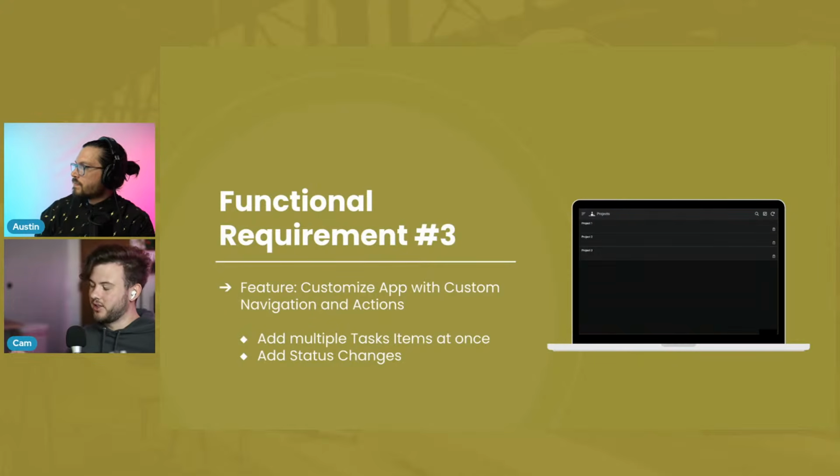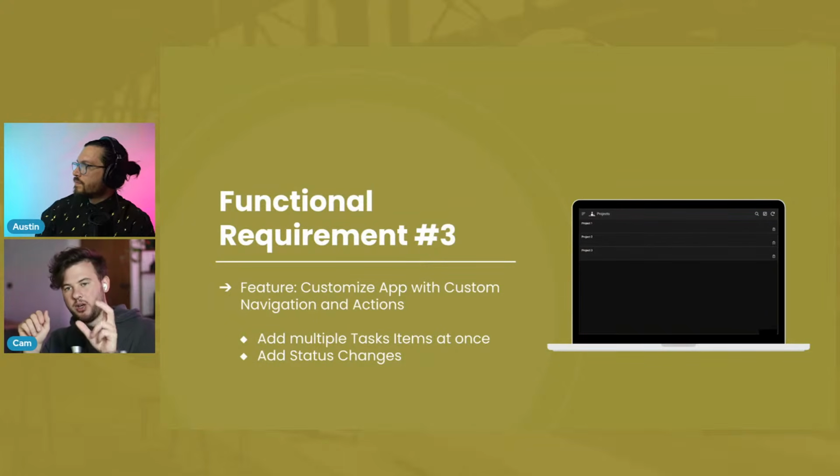And so if you select drywall, plaster, and then painting, and you selected back bedroom, it would concatenate those together and create 3 tasks, one for back bedroom drywall, one for back bedroom plaster, and one for back bedroom painting.